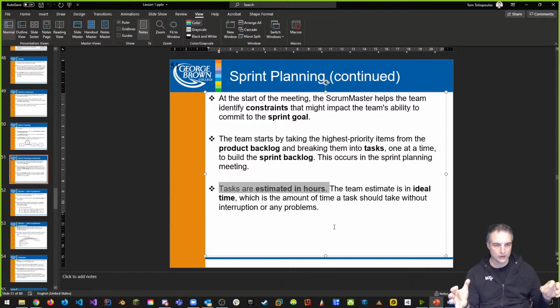And that little video that I listed here in the PowerPoints kind of goes through all the details about how to allocate hours. An example would be you want to allocate certain buckets: 1 hour, 2 hours, 4 hours, 8 hours. Anything that's in between, I believe you go to the next highest bucket, right, for time, right? So you don't have like a 6-hour object or a 5-hour object. It's either 4 or 8 hours, as an example. Or if it's bigger than 8 hours, then it's too big and you need to break it down into smaller chunks. That's why they force you to think about things in story points or hours.